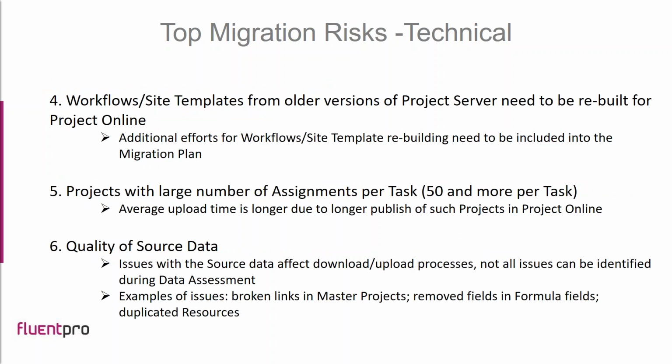In Project Server, you might have workflows, project workflows, and site templates that you use to create project sites. What we observed is that workflows and site templates, especially from Project Server 2010, need to be rebuilt for Project Online, because of architecture differences and the way they were built in older versions of Project Server, they're not supported in Project Online.